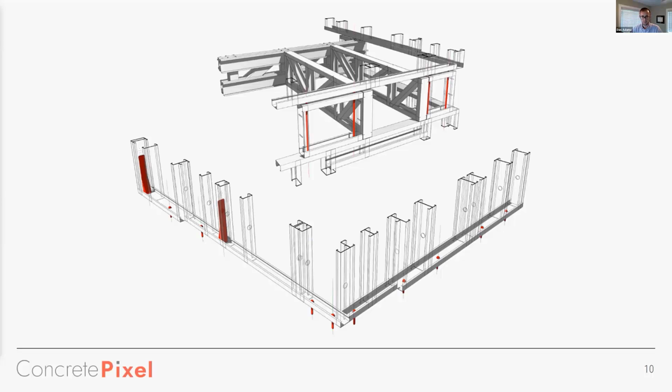Extremely tight tolerances can be achieved, as tight as 1/8 of an inch. Hold down locations can be anticipated and identified well in advance. And the stud tracks can be pre-punched at each bolt location, which eases the process of mapping out bolt locations in the field.